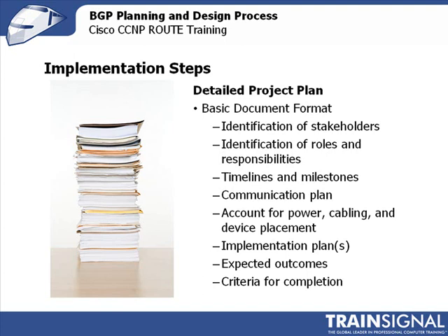The roles and responsibilities, whatever timelines or milestones, usually with specific dates and such. A communication plan for making sure any changes that are going to happen are properly communicated. Power cabling, device placement, implementation plan itself, outcomes, and what the criteria for completion are. If you don't know what it should look like when you're done, you're going to have a hard time knowing when you're done.